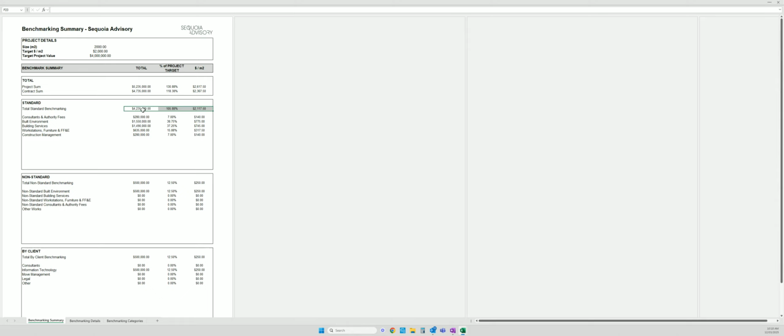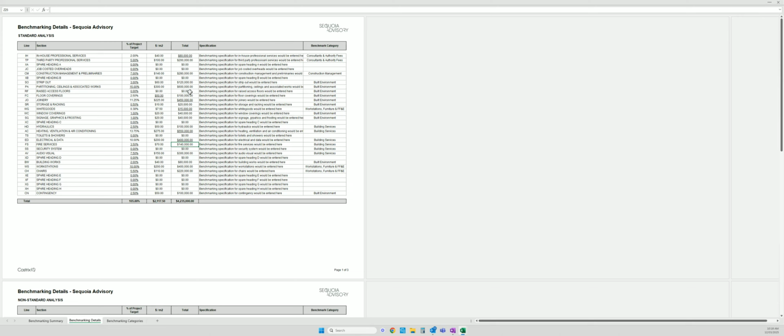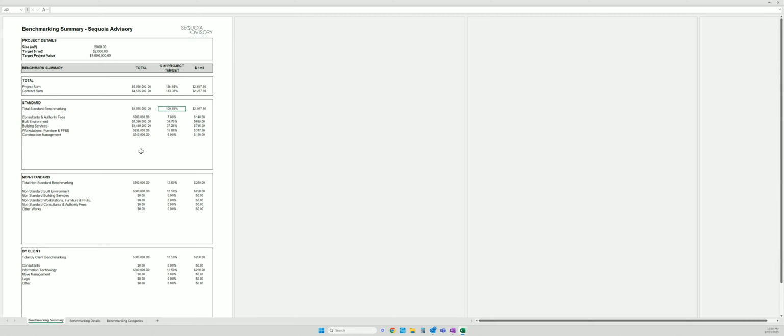We're $235,000 over allocating on the standard. So we may say, where can we save that $235,000? We may bring down partitioning by 100,000. May bring down strip out by 60,000. We may bring down the construction management and prelims by 40,000. And so you're benchmarking with the client to bring that number and that model really to where we think it's going to be.